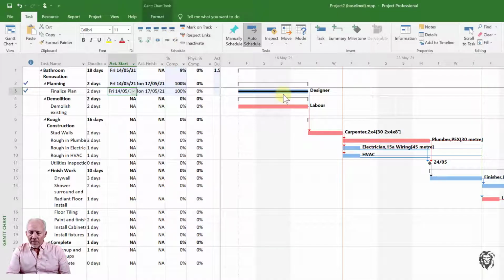And we see it takes this line and it shows your progress line. Now I've made mine black because it's nice strikeout and bold, and I see that that task is finished. It's also no longer marked as critical because tasks that are finished and in the past can't be on your critical path because they're done. They're behind you. So that's really the first task, and that's kind of the simplest way of updating things.